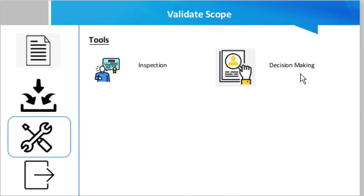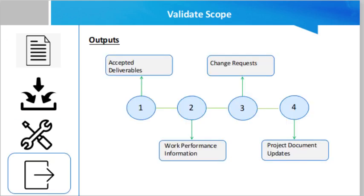Decision making techniques evaluate alternatives in a group setting and reach an agreement leading to a final decision that delivers the desired objectives. The first output of this process is accepted deliverables — deliverables that meet the acceptance criteria of the project management plan and are approved by the appropriate stakeholders. Getting approval is the primary output of this process and is typically performed by the project manager, the customer, the sponsor, and the functional or operational manager.